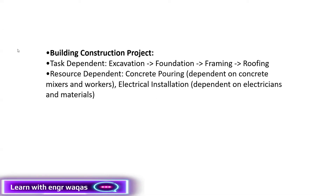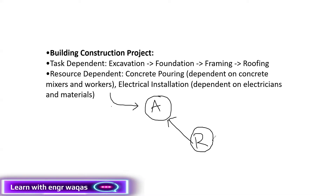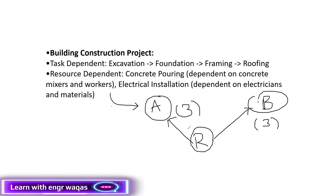Resource dependent activities are activities which are not following the global calendar. These activities are not depending on any other activities. We have defined an activity and assigned it a certain resource. Now, this resource availability is not as per the project schedule — it's a shared resource, also working on another project. Let's say this resource is available three days a week on this project and three days a week on another project. So this activity is going to follow that resource's availability.